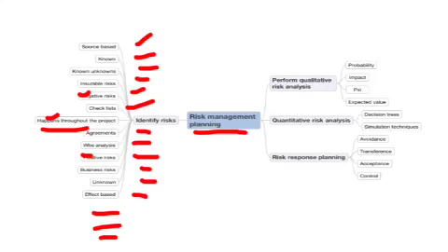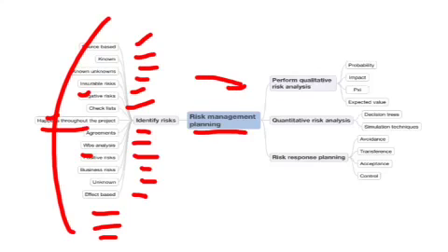So risk management happens throughout the project, and every risk we cannot manage, so we have to prioritize. The first prioritization is qualitative risk analysis. When we say qualitative, for every risk we attach a probability factor, maybe from 1 to 10 or 0.1 to 1.